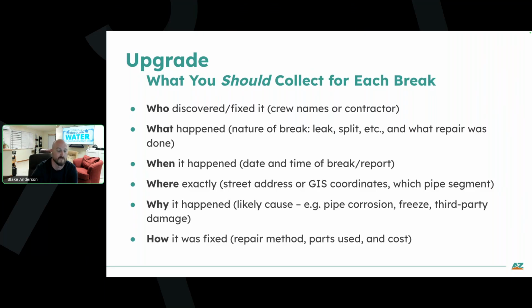And so you're going to want to include in there what materials you used, what parts you used, how long the water was off is great information to collect, and then how much it cost. So if you have to put in some macro fittings, stick a pipe, you've got a backhoe that's out there with a 3-man crew. What's the hourly rate with benefits for that crew? What's the time for the backhoe worth? And what are those parts?